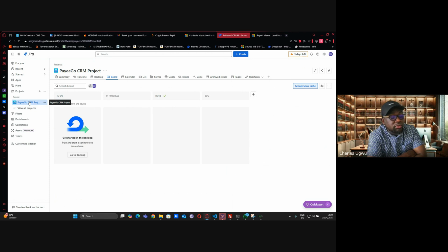Once we have the sprint retrospective, the next thing is we move to the closure stage, where we look at all the closure items, like signing off from the client or the project sponsor, and then the project manager will write the report and close the project. So we already have the items in the boot camp. We follow it as it is in this boot camp, and that's it.